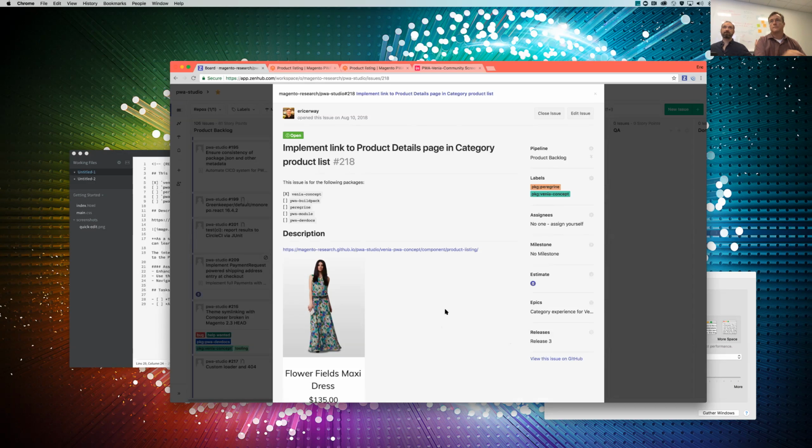There are a lot of folks in the community asking for work who aren't here today. If I'm imagining one of those folks implementing this, it's a 5 or an 8. Whereas if it's Art or Jimmy doing it, it's a 3 or a 5. So can we say 5? Yeah, that's fair. Let's do it. Cool. 5. I think it also gets us in the habit of having some discussion around the estimate, which is a healthy exercise.